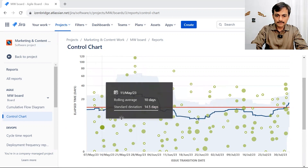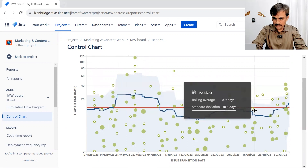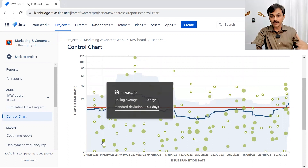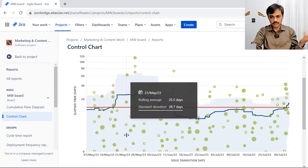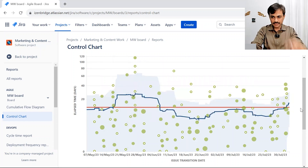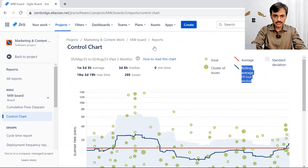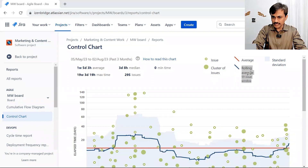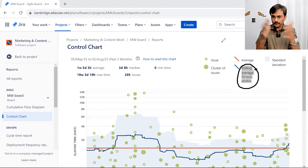Before that, let's talk about rolling average and standard deviation. The red midline is the average cycle time. Dots below average mean issues finished faster; dots above average mean they took more time. The rolling average is the curved line you see here. Based on the number of data points, Jira picks an odd-number window — in this case 59 issues.